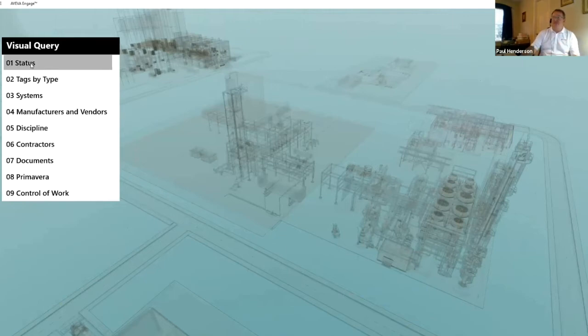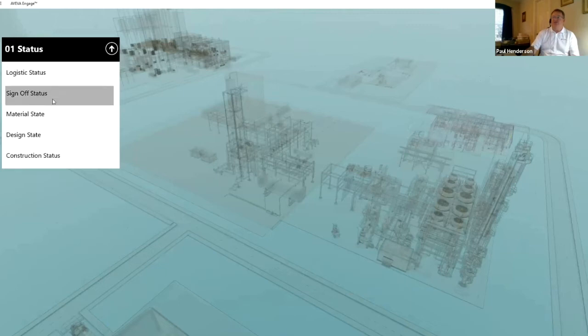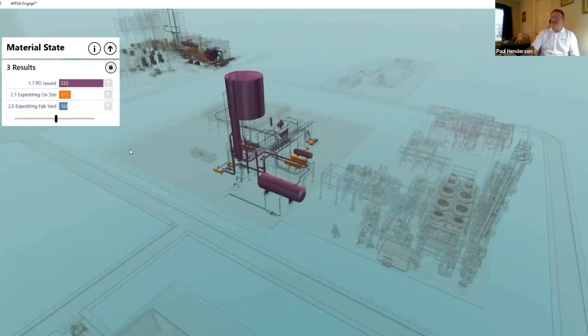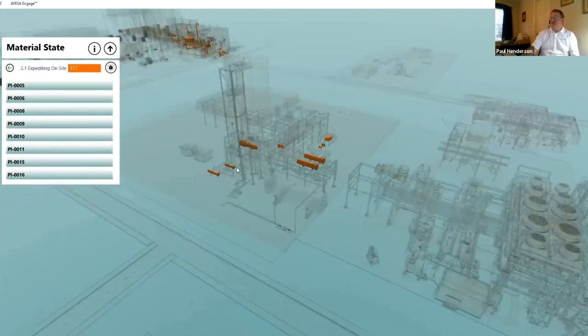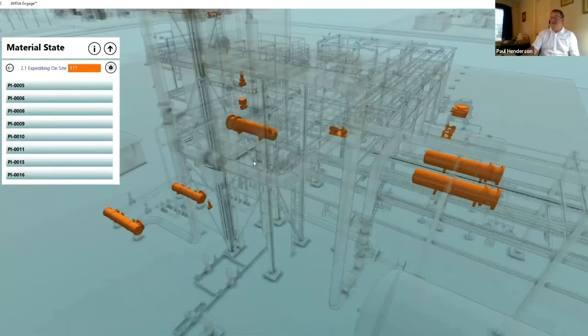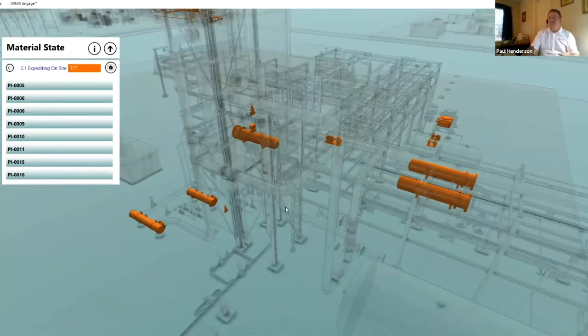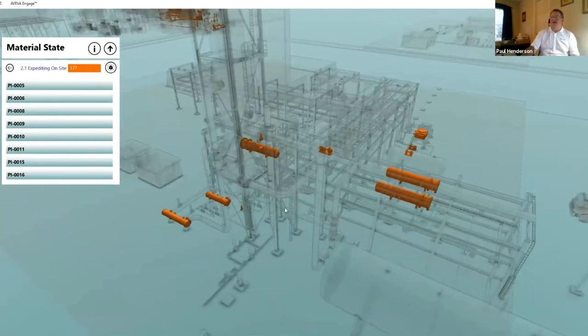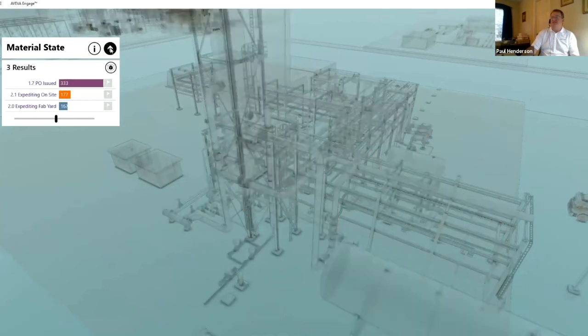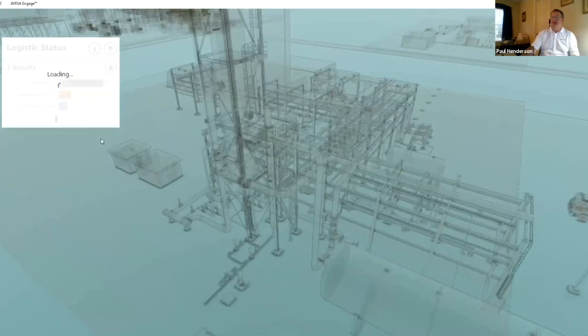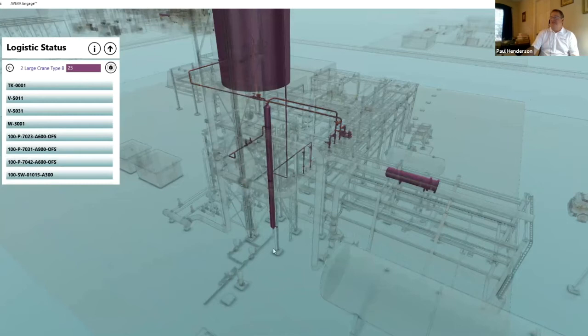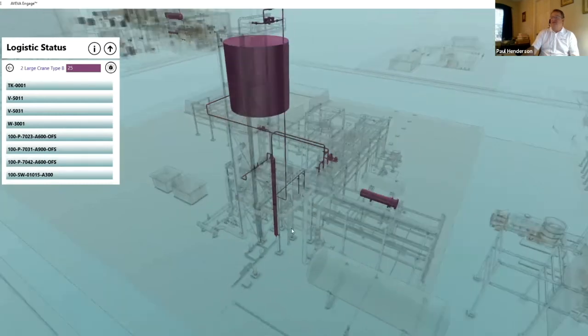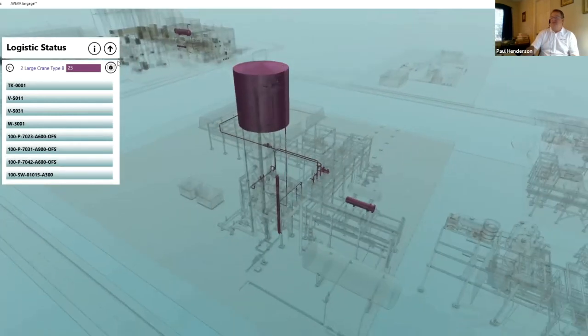So for like on the construction or EPC side, we can actually look at different aspects of our construction. Like how many POs are issued? What did we have expedited to the yard? We actually get a visual query of what has been expedited or what our POs are. If we have any kind of logistics issues that we need to look at, we can actually look at that. If we need to have a large crane, we can actually say these pieces right here, we're going to need a large crane on site for these.